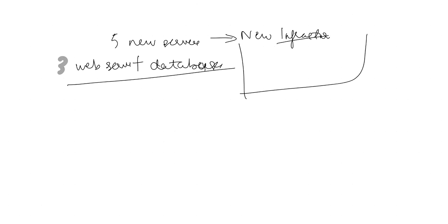You need to make sure the new servers will be built to the same specifications as the old ones. Once implemented, the new equipment has to be tested, and you have to make sure there is no degradation in functionality. Finally, only then, as the third step, you make sure the old equipment is decommissioned.